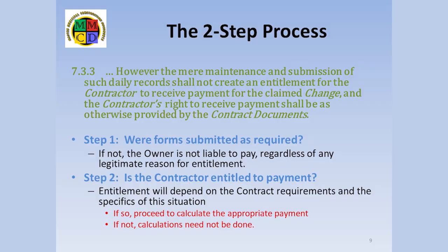the contract documents." In legal terms, the provision of the daily forms is a "necessary but not sufficient" condition. The result of this is that failure to provide the forms bars any claim at all, irrespective of other entitlement. It is an overriding obligation.